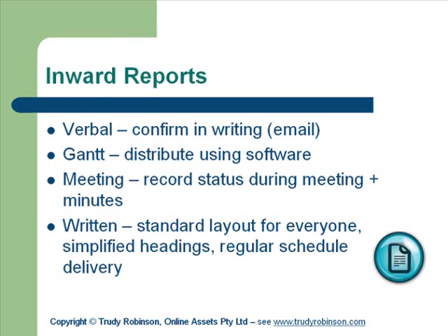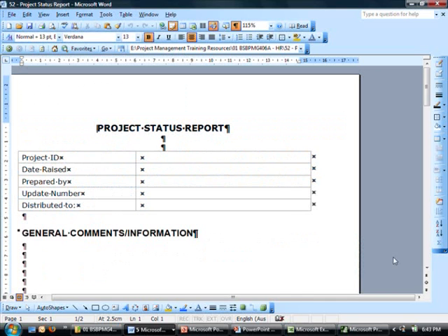Okay, the other thing is a written layout. Now, this is something which I used a lot in companies where you've got people who may be being a bit difficult, and so therefore it's better to actually get a written report in exactly the same format from everyone every week on the same day at the same time. So it'll get to be known as the Tuesday status meeting, or you've got to get your project status report in by Monday morning at 10 o'clock every week. If you do that, then everyone will have to give you the same level of information at the same time, and then it's easy for you to collate it. You use the same layout and the same template, and you just drag and drop, put it all in together so that it all collates together, so you just summarise it. So this is an example which I have given you.